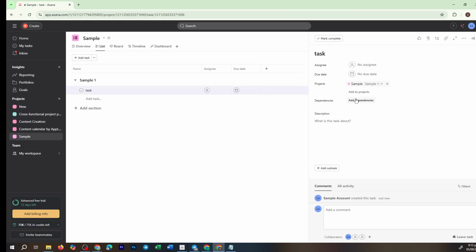The core of today's guide focuses on transforming those vital tasks into milestones. For this, simply click on an individual task. On the right-hand side of your screen, there's a drop-down menu where you can select Convert to Milestone. Milestones serve as major checkpoints or achievements, allowing for easy progress tracking. They stand out as significant markers that help in assessing how far the project has come and how much is left to the finish line.